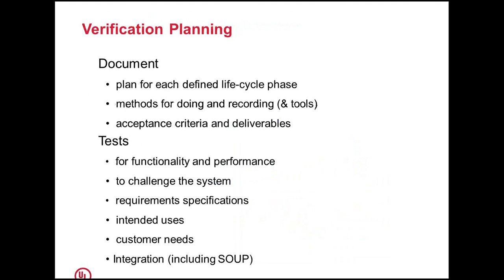Verification planning, plan for each defined lifecycle phase. When you are in a requirements phase, you can clearly specify how you are going to verify the requirements, what tools you will be using, what the acceptance criteria are, and what you will be delivering. And you will do the test for functionality and performance to challenge the system, all those things.